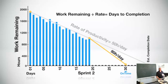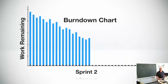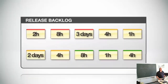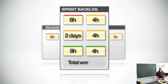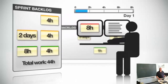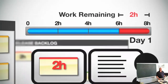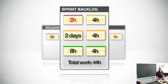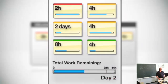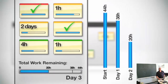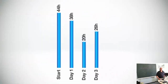So where does the data for this incredibly useful burndown chart come from? As part of the release planning process, we created an estimate for each user story in the release backlog. The collection of these estimates for a given sprint represents the total amount of work that must be done to complete that sprint. As each team member makes progress on one or more user stories, they simply update the amount of time remaining for each of their items. The total remaining time changes on a day-by-day basis, hopefully going downward until it hits zero when the sprint is complete. The burndown chart aggregates this remaining work data and shows it visually — it communicates a massive amount of information in just a few seconds.